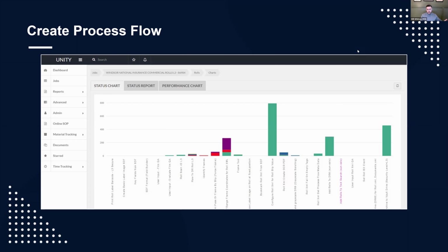So during the M1, I was able to talk to my client, say, hey, we found this. This is outside of the scope that we talked about, and the pricing set and all that. They didn't even know that was in there. So this is common where the client does not even know what's in their own material. A roll holds 2,500 images. Imagine if you had thousands of those. You're not going to know everything that's on there. It's pretty much impossible.